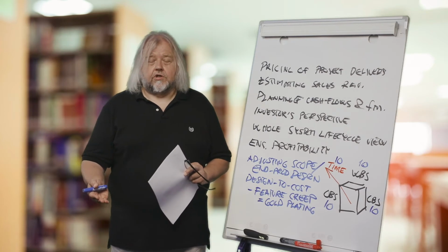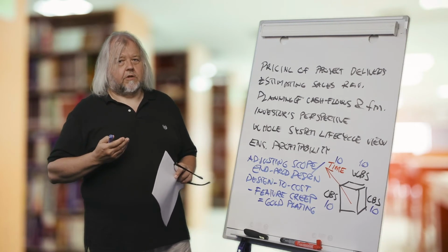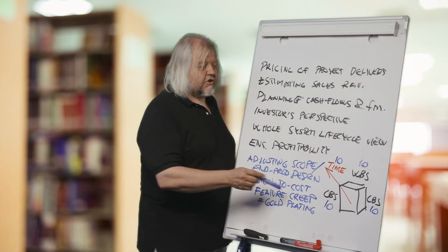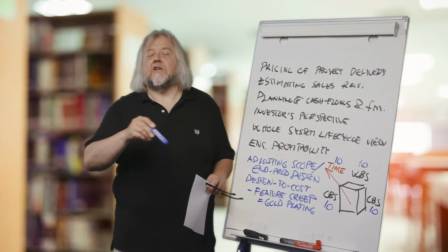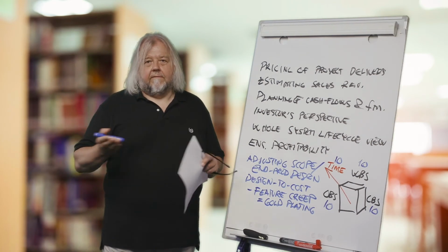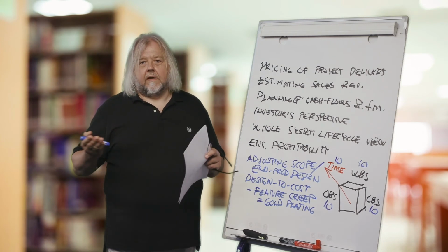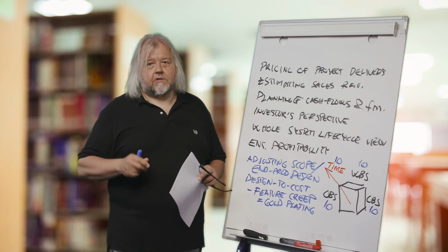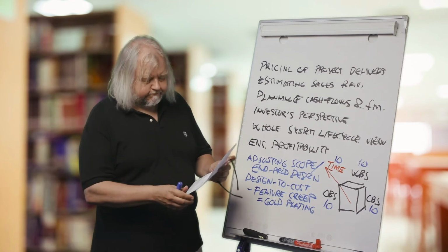But if we really go into such detail, our project management becomes not the management of a project, but a management of a system for managing the project, because we must adjust our estimates all the time, as estimates are updated throughout the project until the end. And of course, when we are comparing the actuals to budget, for example, we get a lot of deviation reports at the very low level, because there will be deviations.